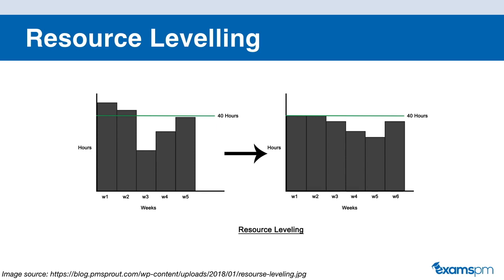Although this is feasible on paper, in reality it is not as feasible. So what happens is that by using resource leveling, you're extending the schedule. Instead of completing this project in five weeks, you're completing it in six weeks in order to account for the fact that your workers can't work more than 40 hours per week.